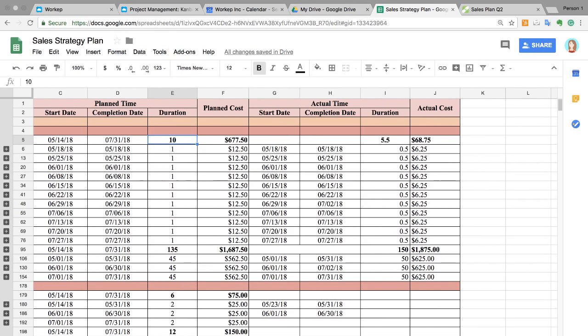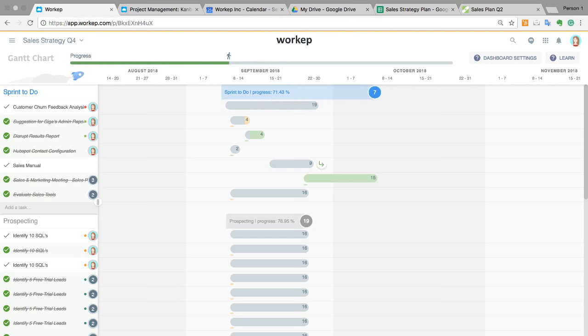So another thing that WorkUp allows you to do is precisely that. You can oversee how many days you overran a certain activity. So let's, for example, take this one right here. When it's in green, that just means that you are ahead of schedule. So you've completed this task 4 days before the deadline, which is beneficial because that means you save money, that means you save time doing that task 4 days before schedule. But what happens when you complete a task 4 days after the schedule?